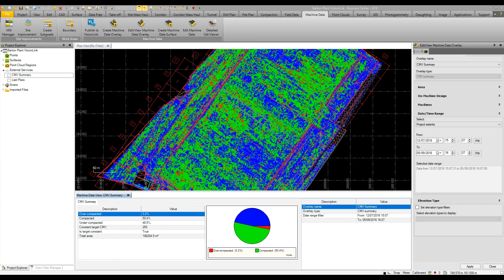In green, we can see where we conform to specification. So we can see where we may have more work to do to roll areas in blue, or maybe have to remove material because it may not be up to standard.